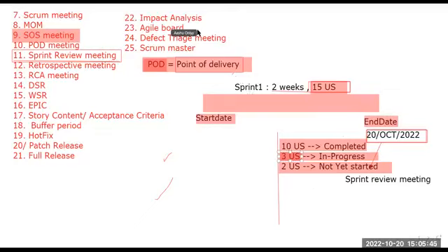Yes or no? Similarly, if the user story is in progress but not yet completed, we can move this user story into the next sprint. Like the next semester, we will get our next sprint. This is sprint 1, where we are developing it, and similarly we will get a next sprint also. Because we have already started this in-progress user story, we have to finish it, so we finish the same user story in the next sprint. Getting it, guys? Yes, sir.